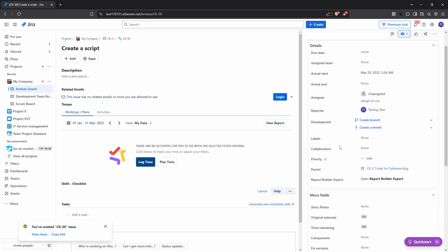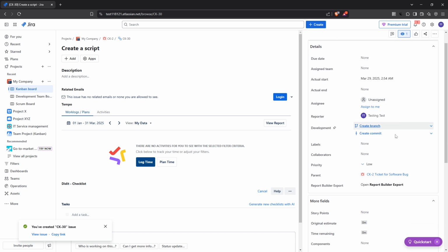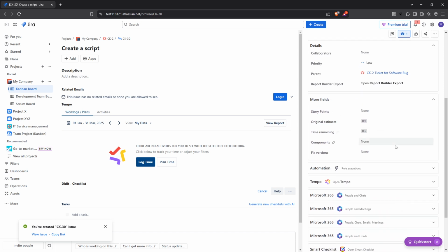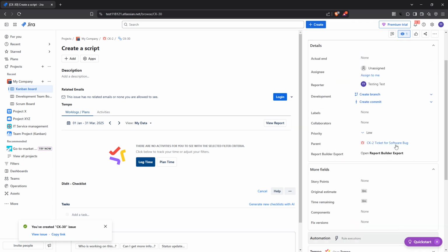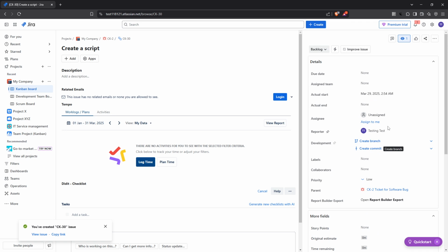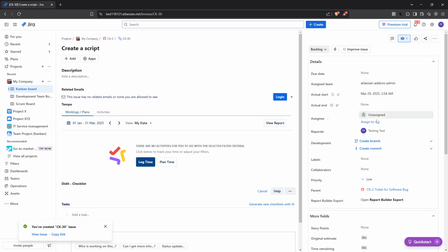Firstly, it's important to reserve subtasks for execution purposes rather than for planning. Planning should be done at a higher level, while subtasks should serve to execute specific parts of that plan. Also, consider assigning subtasks to different team members according to their skills and availability to promote parallel work streams, which can increase overall efficiency.